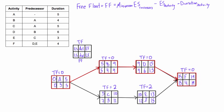Let's calculate the free float for activity A. The minimum early start of its successors — we have five and five, so we pick five. We subtract the early start of activity A, which is zero, and subtract its duration of five. So: five minus zero minus five gives a free float of zero.